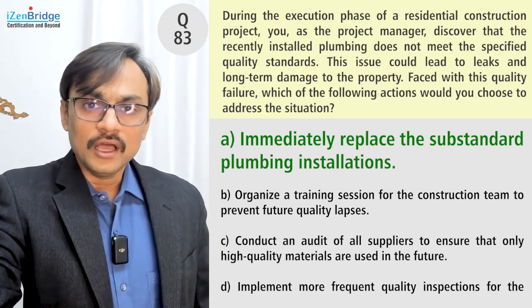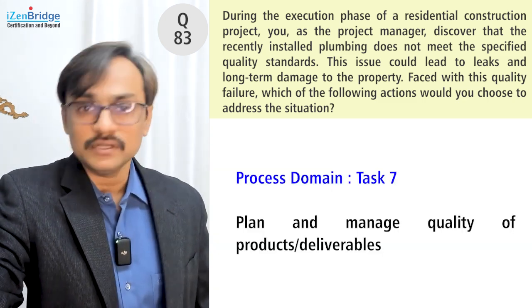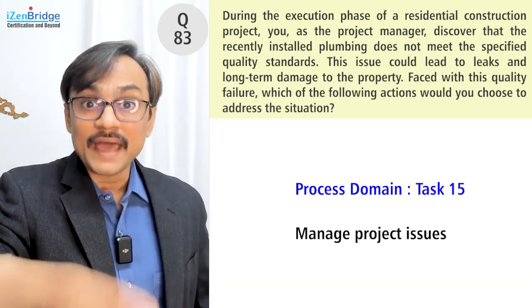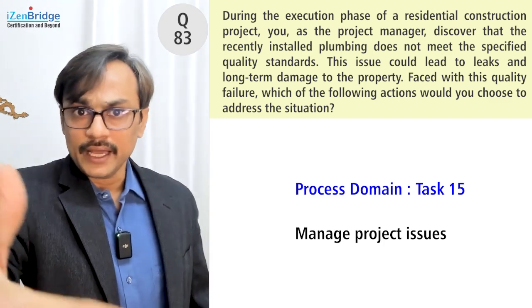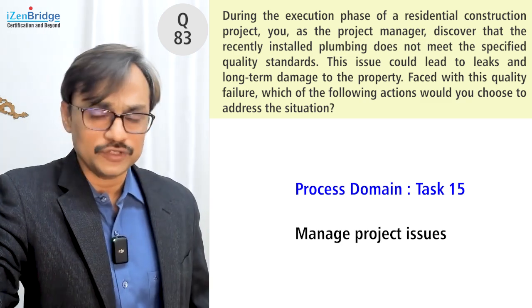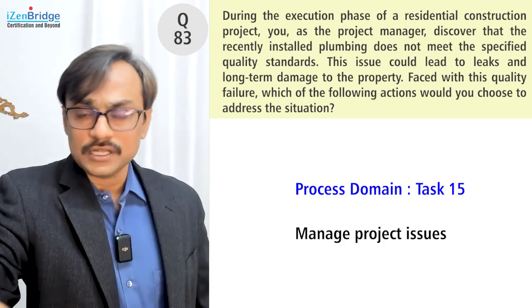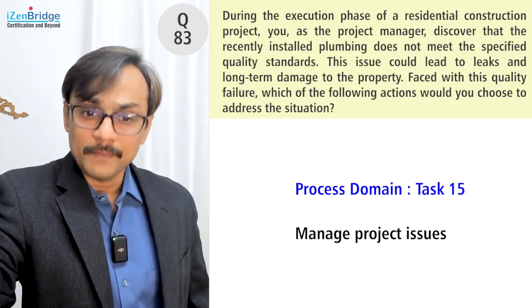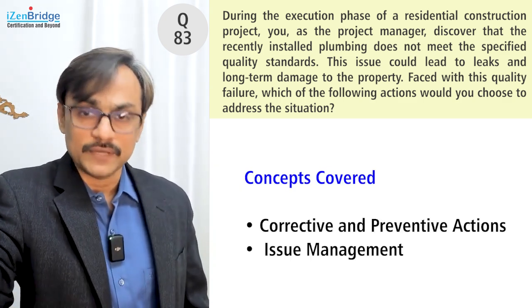Now, where does this map to our process and tasks? This is definitely mapping to Task 7 in our process group, talking about plan and manage quality of product and deliverables. It also maps to managing project issues — you need to acknowledge, analyze, prioritize, and resolve the issue as per the priority and satisfaction level needed for our stakeholders. Later on, we need to do a lessons-learned analysis and a detailed root cause analysis so we can take preventive actions — but that is the future path.